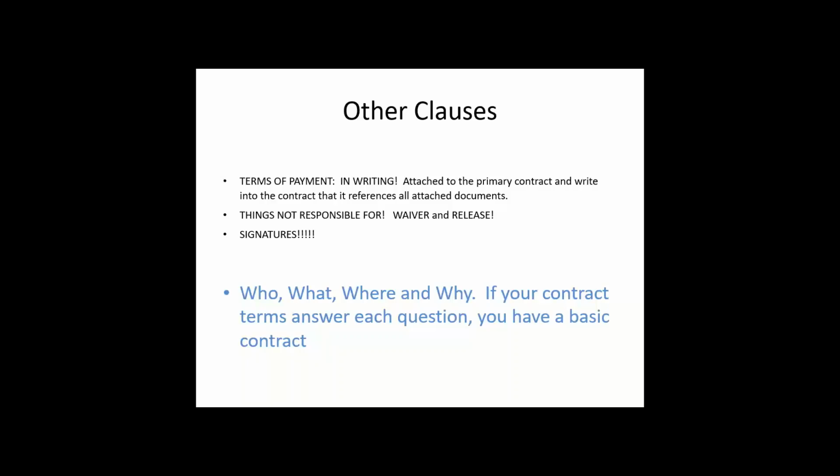You should have some sort of waiver and release and signatures. Very important. The original contract has to be signed by both parties. Any change orders have to be signed by both parties and attached to the original contract. Changes in payment terms have to be in writing.